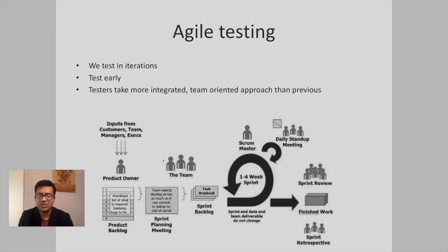As soon as they start to work on it, it is known as the sprint planning meeting, and all these decisions are taken there. Each team member is assigned one or another requirement, which has user stories and some points estimation used for the effort estimation of that requirement.